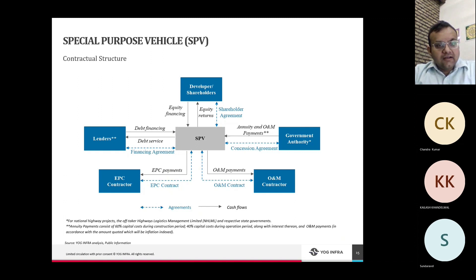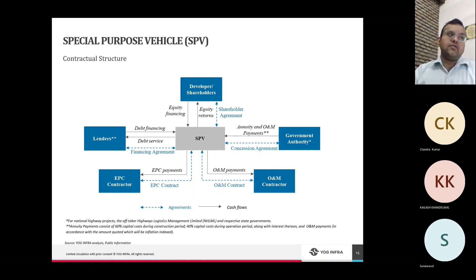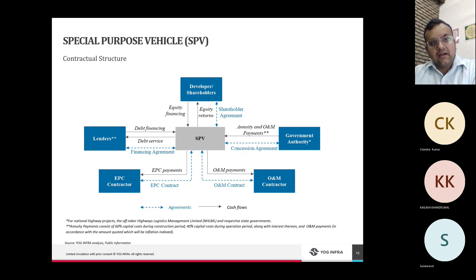A typical ropeway PPP SPV structure includes: annuity and O&M payments from the government authority (NHLML as offtaker — 60% during construction, 40% during operations); equity financing from developers/shareholders; debt financing from lenders; an EPC contractor; and an O&M contractor. For ropeway RFPs, there is a mandatory MOU or long-term agreement with an Original Equipment Manufacturer, who is responsible for maintenance of the project throughout the concession period.